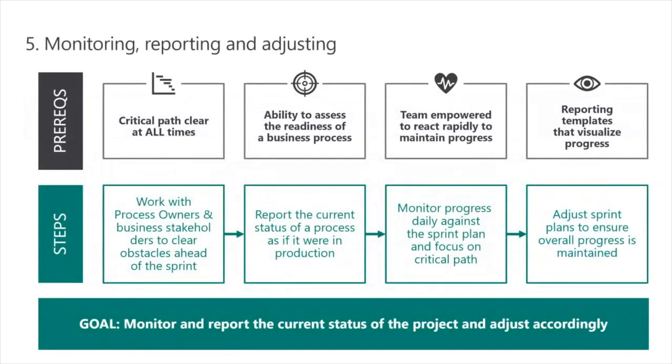Okay, for monitoring and adjusting, which is a critical part of this approach, make sure that on a daily basis you are monitoring the progress of the project, and on a daily basis you are adjusting to the signals you're receiving. The daily triage that's happening has some meaningful action that comes out for the PMO and for the team leads to say, here are the obstacles ahead. This is what I need to fix before tomorrow. I need to go and get this done before tomorrow. It's at that daily cadence that you're adjusting and monitoring.